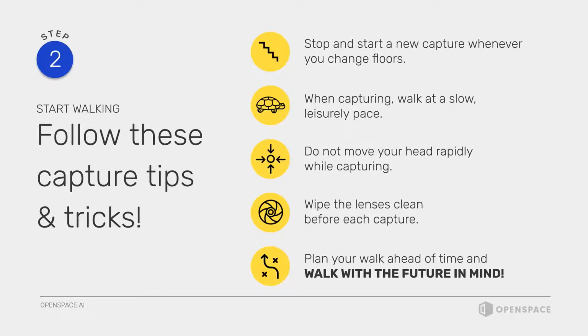And then last but not least, plan with a future in mind. So making sure that you're covering the areas that you want to really be able to access down the line, especially if something's going to be covered up tomorrow, go out the day before, take a capture. Be strategic with this, especially with those video walks, knowing that you have 3 5-minute video walks per week. Do that strategically and take a capture before the concrete is going to be poured, and then the day after it's going to be poured.